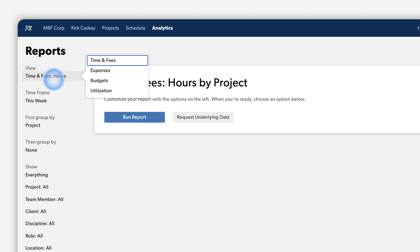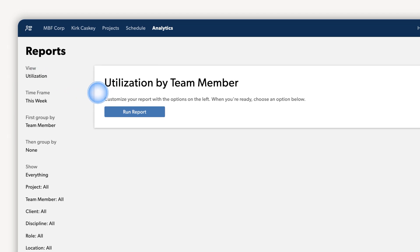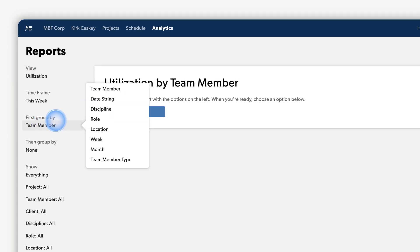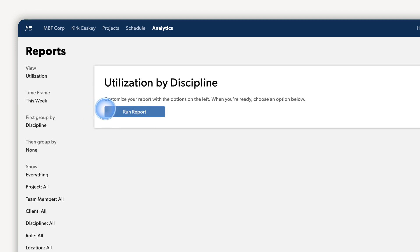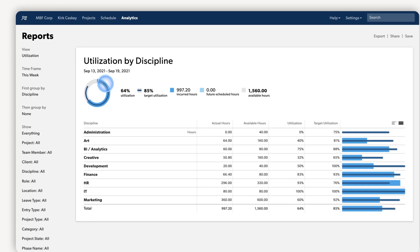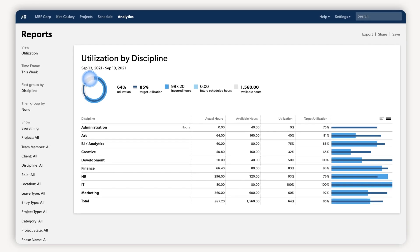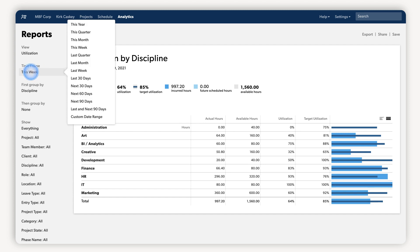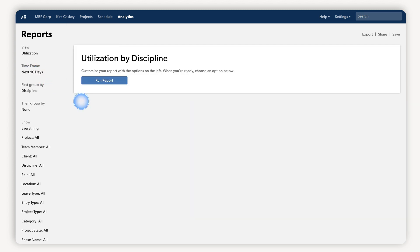With the utilization report, you can view the hours staffed for each team member, see which teams are overbooked, and make a business case for hiring, complete with a plan for what projects they will own, and adjust the time frame by week, month, quarter, and year.